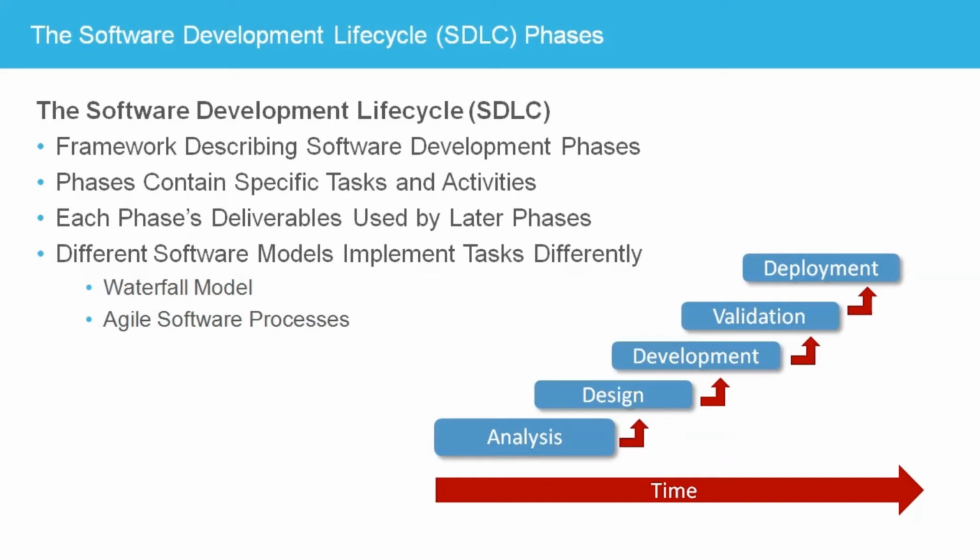The last phase of the SDLC involves deploying the validated software application into the production environment, or through a supply chain to be sold as a product. This phase may involve additional internal and external acceptance testing with small groups of customers to allow resolution of issues before full production.